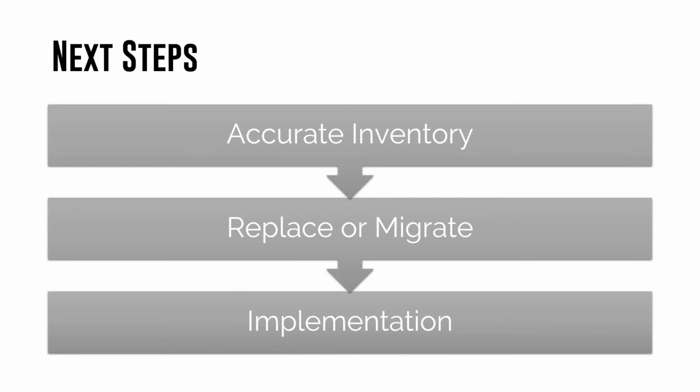In terms of next steps, for identifying, planning, and figuring out what to do, I think the first step is really having an accurate inventory of those systems. Again, how many Windows 7 computers do you have in production? When we look at our list, we know that some, maybe not insignificant, portion of those Windows 7 computers are loaners. They're around, just hanging out, but maybe they don't represent production, so our actual numbers of systems are going to be a little bit lower. Same thing for the server environment: what is actually production? What do you need to have up to date versus what is just hanging around because you haven't had a chance to decommission it? So develop that accurate inventory so you know what you're working with.